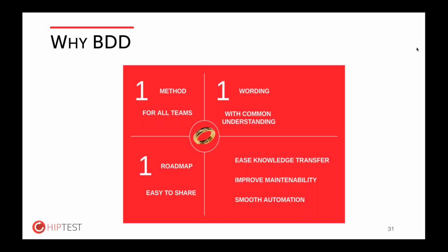The other point that was really important, one of the biggest drivers for Parkeon to use BDD was knowledge transfer. You may know that for this kind of huge project, you have the build phase, and at the end of the build phase, when the system is live, you have a maintenance phase.